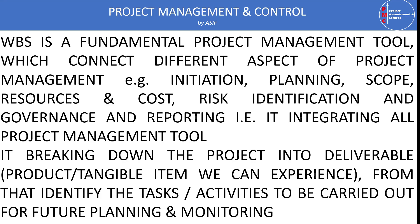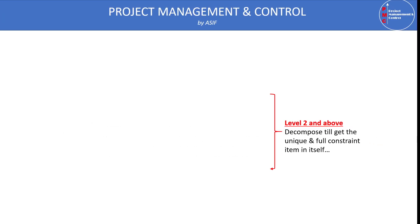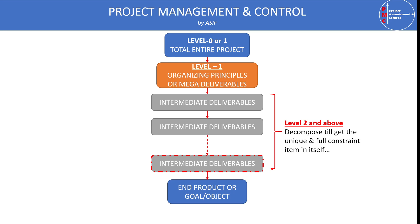From that deliverable or product, we identify further tasks and activities which can be carried out for further planning and monitoring of the projects. If you define the work breakdown structure in a pictorial way, you can see that we have level 0 or level 1 which is the total entire project. The next level will be level 1 or level 2, which is the organizing principle or mega deliverables, on which we are further decomposing our project.